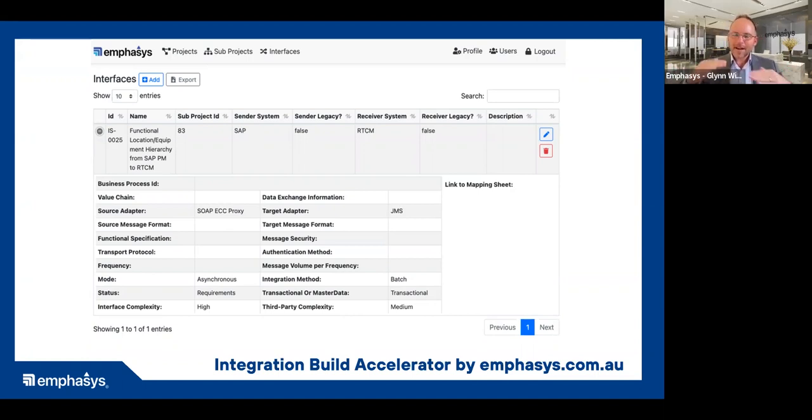So we can even maximize the way that we develop things. For example, you don't wish to do all your hardest integrations first with your vendors, who are not necessarily going to assist you. So you might wish to do some medium risk integrations first, and then move on to some easier ones, followed by some hard ones. So there's a way and there's a footprint to manage these things.